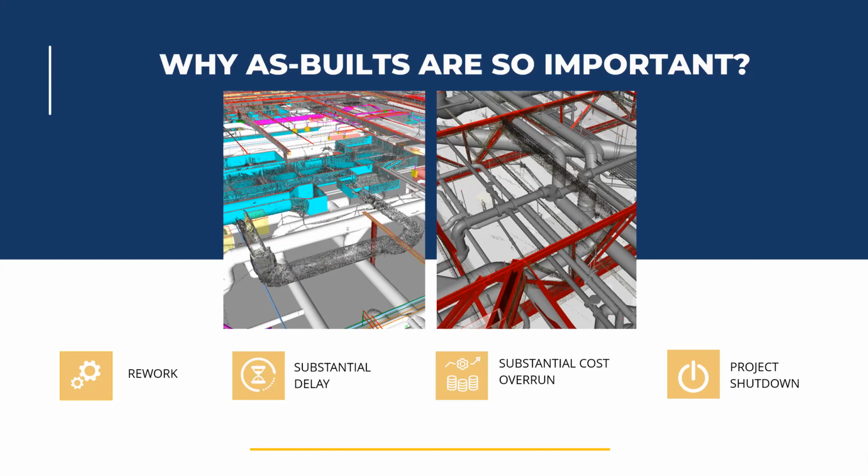We had another project that got into a 6-month delay because of the variances we found later in the field. We learned enough lessons that having an accurate understanding of the existing conditions from the get-go is extremely important. And this is where Solidspace comes into play and adds a lot of value to our process to help us minimize the rework and the risks.